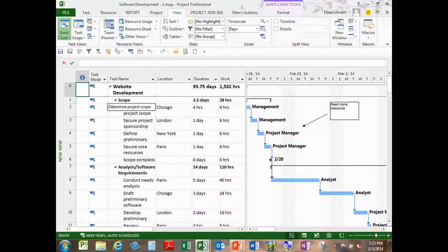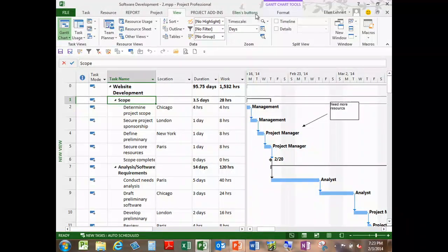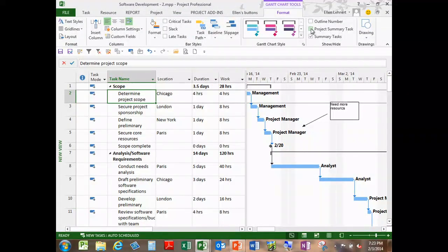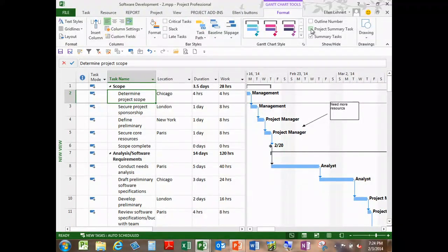I know this is probably something you all know about, but I can't tell you how many times, almost weekly, I get a template from somebody or a project schedule, and they have taken task 1 and made it the highest level of the work breakdown structure because they're looking for something called a project summary task. They're not aware that you can just turn it on. So what I'm trying to do is just remind you, you just turn it on. Don't try to create it yourself.